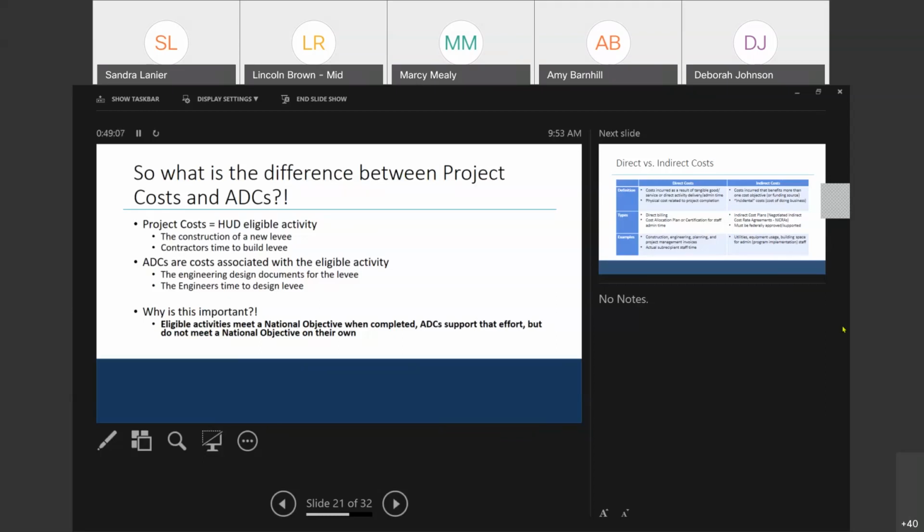The actual things that you can tie to that activity, like procurement and Davis-Bacon, things that make that project move along, then those are the things that you would build into that contract if you're contracting those services. If the UGLUG's contracting those services and you're on the other end of building that bid and structuring those deliverables, yes, those are the deliverables.